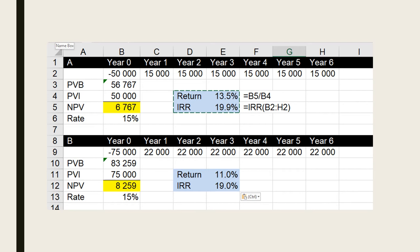Often we get the same outcome — both metrics, the NPV and the IRR, point to the same project. That's usually the case. But in this particular example, NPV chooses project B and working out the return, however you do it, gives you project A. So which one should you go for? Many people think you should use the return, but actually you shouldn't. You should always go for money in your pocket. Although we have invested more money into project B, it gives us a higher value that we've created.